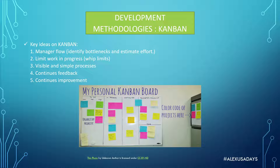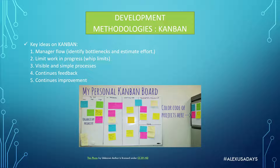For Kanban, it's essentially the whiteboard with sticky notes. Specialized Kanban boards like Trello are very popular. The key ideas of Kanban: you want to manage flow — identify bottlenecks and estimate effort so the flow is seamless. You also want to limit work in progress by setting WIP limits, so you don't have multiple tickets sitting in one column with nothing being done.